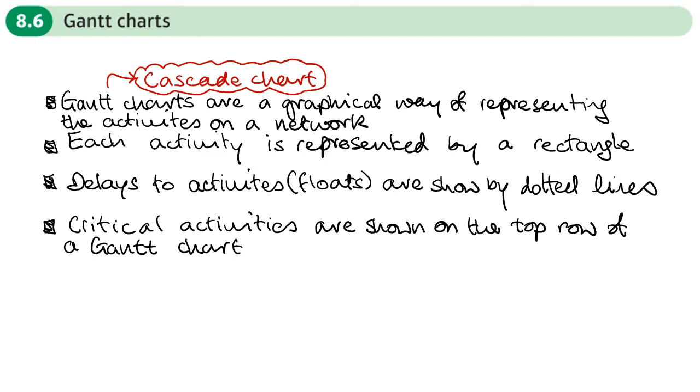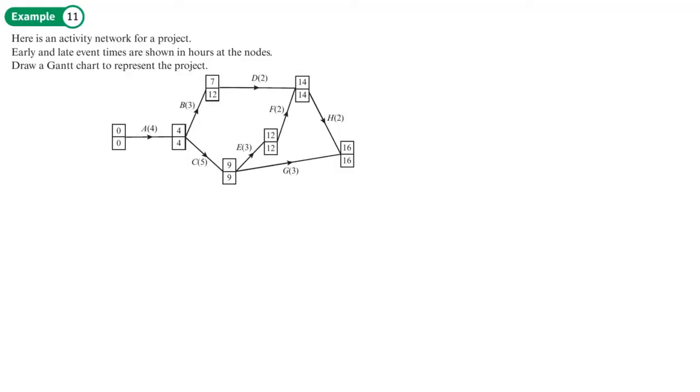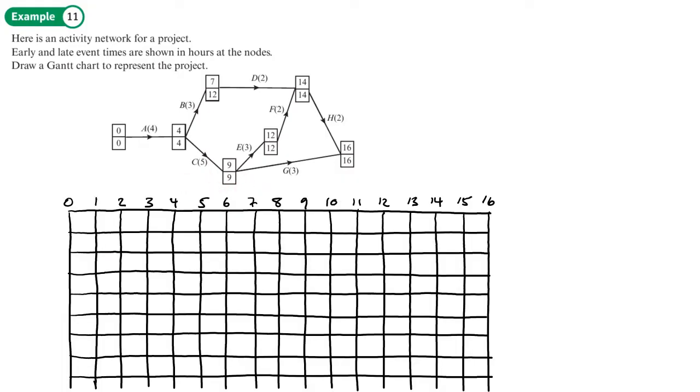Where we have critical activities, they are shown on the top row of a Gantt chart. Example 11: Here is an activity network for a project. Early and late event times are shown in hours at the nodes. Draw a Gantt chart to represent this project. Now normally in the exam, a template will be drawn, but for the purposes of this question, I'm going to draw my own template. So here's my grid.